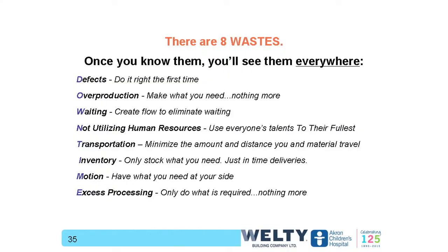Now, the goal of getting rid of all waste is theoretical. The way they define waste, we would not be able to get rid of it all. There are 8 wastes, and we are using the same system that Deming or the Toyota method used in identifying waste. If you've got a center of excellence or you're working on Lean or Six Sigma, you're familiar with these. We focus on every one of those to try and reduce it, the goal being to get it as low as we can. On Children's Hospital, we were able to take about 1/3 of the 60% waste out. We were able to get 20% out of the project by applying these principles.